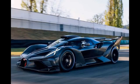LJRC needs to carefully monitor their cash flow throughout the project. They currently have $65,000 remaining after the engine purchase, $150,000 minus $85,000. As the chassis, aerodynamics package, and labor costs are paid, the cash flow will continue to decrease. It's important to ensure enough remains to cover material purchases and any unexpected costs throughout the remaining project phases. LJRC can create a cash flow forecast to visualize their cash flow over time. This will help them identify potential shortfalls and make adjustments as needed. For example, they might negotiate payment terms with vendors to delay some outflow or secure additional sponsorships to increase inflow.